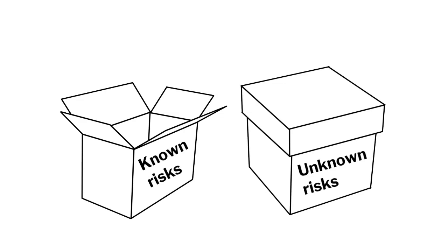Risks that are threats. Some risks represent threats to the project. Such risks are unfavorable but may be accepted if they are in balance with the reward that may be gained by taking the risk. All other risks that have not been identified and analyzed can be classified as unknown risks. Unknown risks cannot be managed. Such risks are often addressed by applying a general contingency margin, for example, schedule margin, budget margin, based on past experience with similar projects.